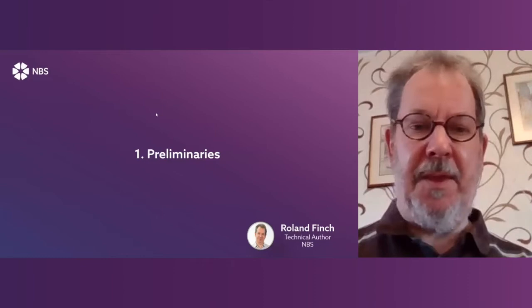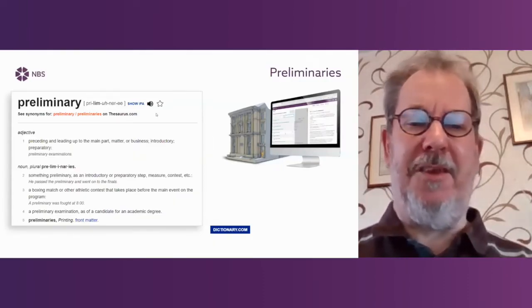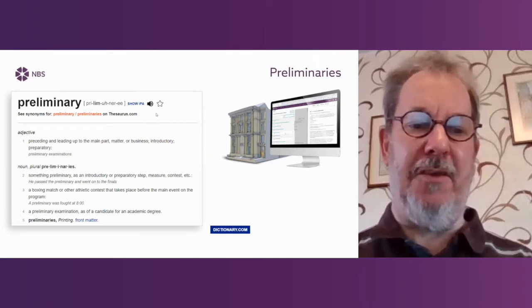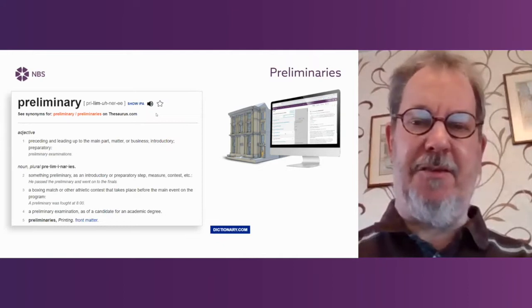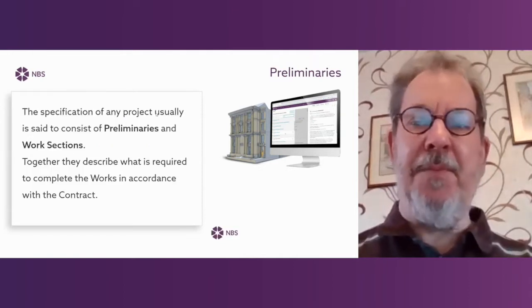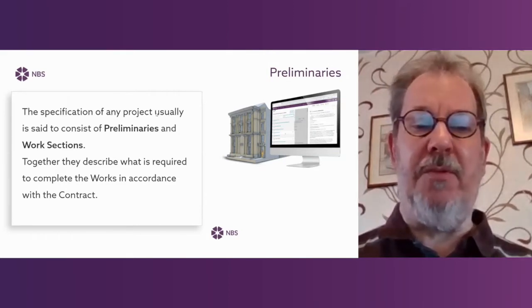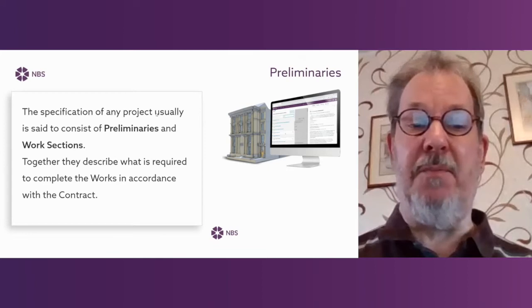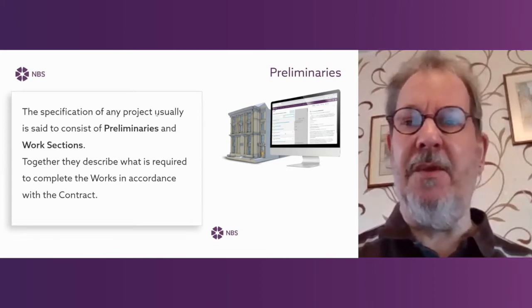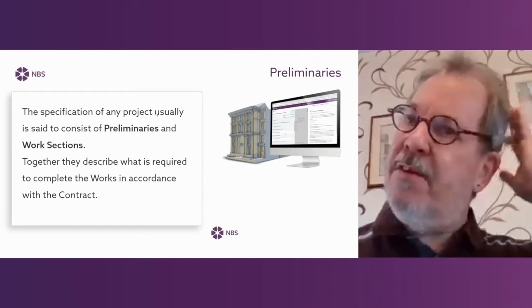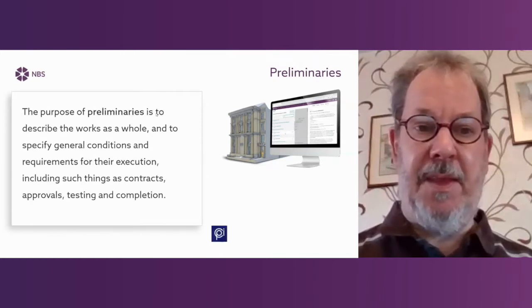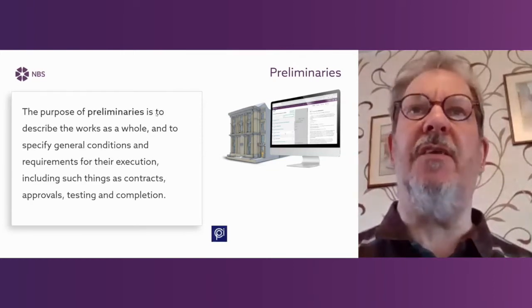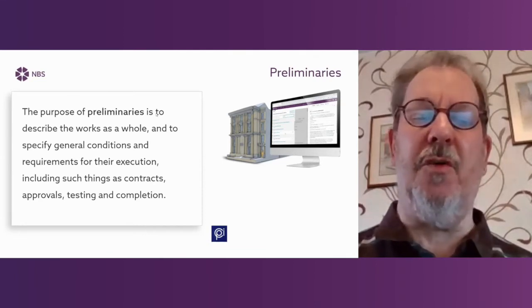Welcome to the first part of the webinar where I'm going to talk to you today about preliminaries. Preliminary - that's a dictionary definition, it's a Latin word meaning the things that go before. But the focus that we're going to have today is on general conditions. The specification of any project comes in several parts, but the main parts are preliminaries and work sections. The important thing to remember here is that the preliminaries and the work sections go together to form a specification. And the purpose of the preliminaries part is to describe the things which apply to the whole of the job.